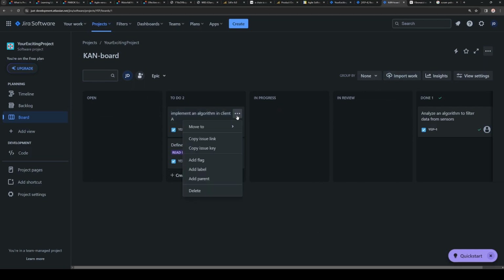The Scrum Master could mark as a flag the stories which will be prolonged to the next sprint, because sometimes you might wait for the review 1 hour and make it done. But sometimes you might get a review and then review and then review, and then it will be for the next sprint for 3-4 days more. In that case, the Scrum Master just flagged it. It is for comfort. It totally depends on a team, a company and the culture.